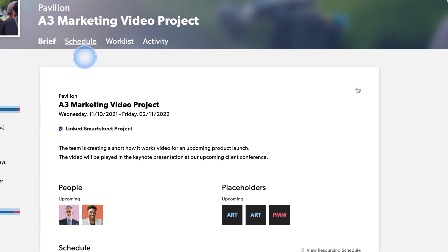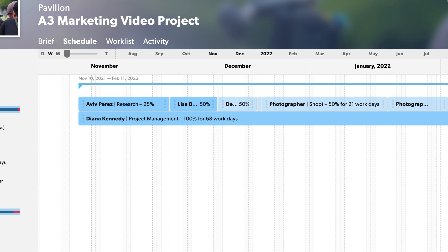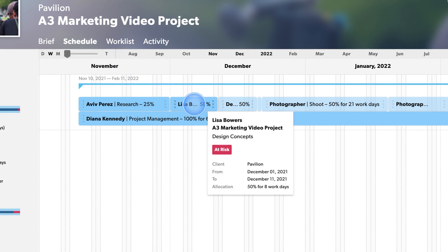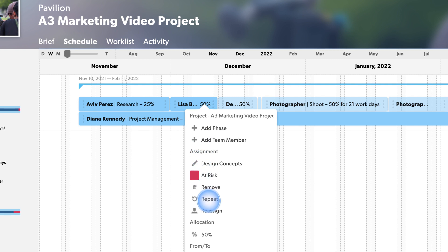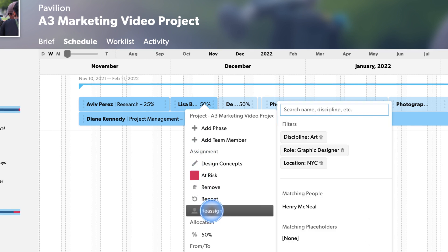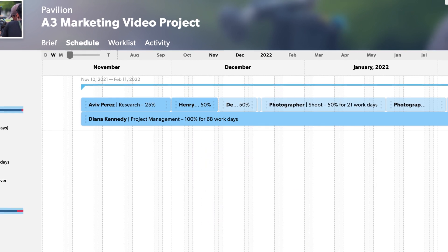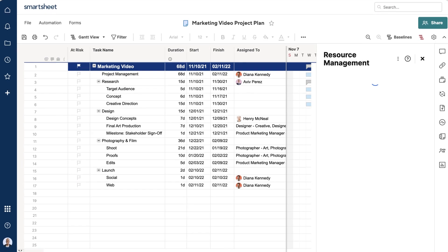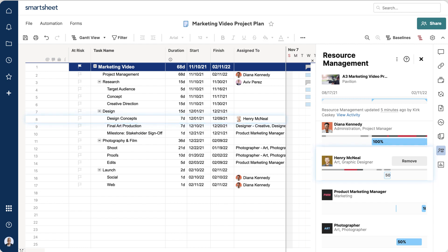For example, let's say Lisa, your graphic designer, leaves the organization, and you need to find a new staff member to complete the project. You can reassign the work directly in Resource Management, and this update will be reflected on the corresponding row in your Smartsheet project plan. This keeps the team aligned and ensures the work keeps progressing.